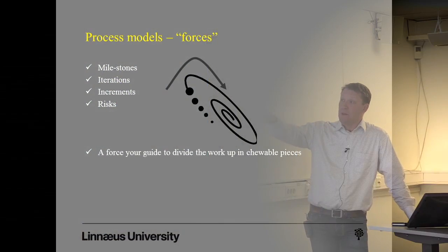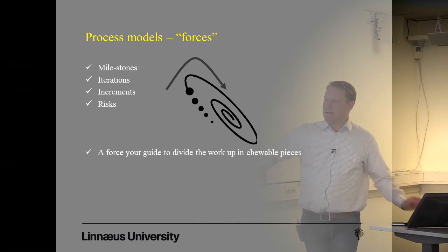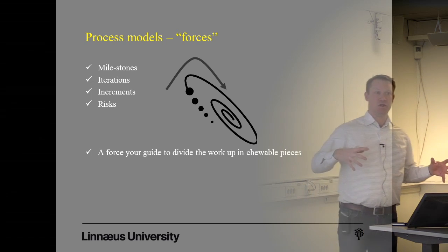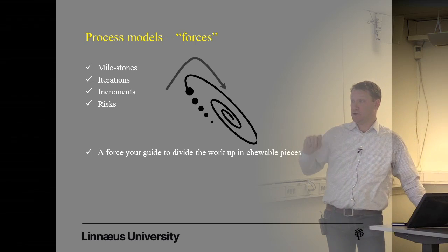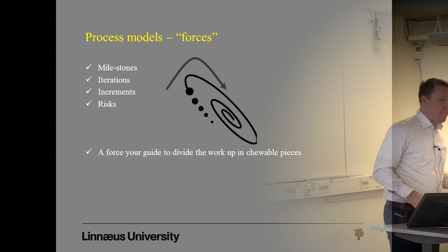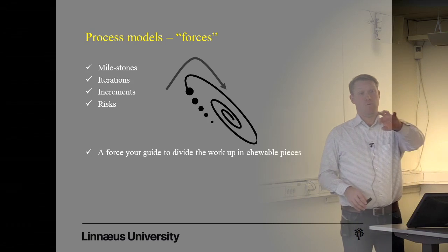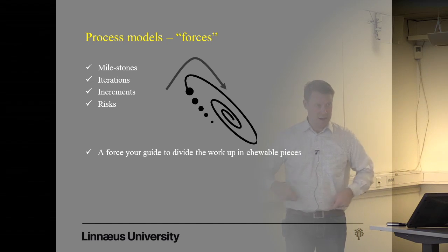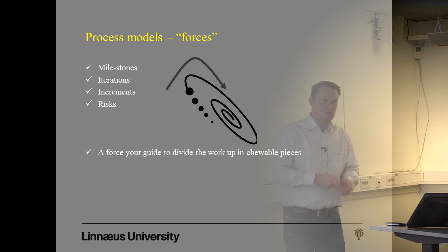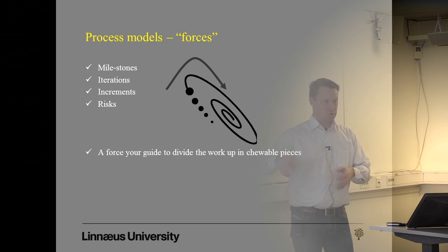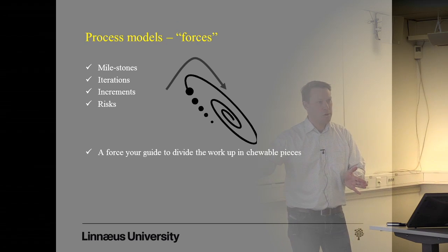Excuse me. A force here is something you use to guide your decomposition of work, an organization of work, to divide the work up into chewable pieces, more or less. So one of the forces you may use is something called milestones. That's similar to what I used as an example before. You wake up, you get out of bed, you make breakfast, you get dressed, so you have a sequence of activities. Hopefully you get dressed before you get on the bus. So you make sure that you achieve certain sub-goals before you continue.